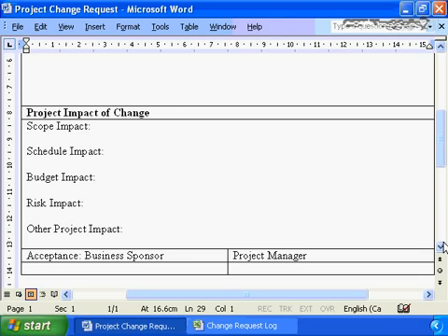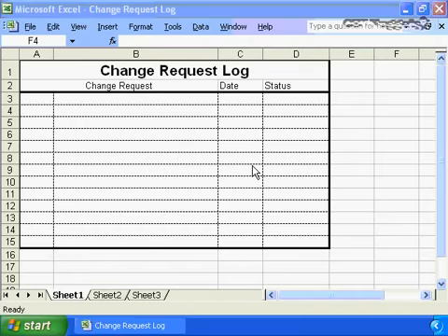Ensure that you're documenting all changes. My preference is you document all changes in something as formal as this change request log, and that this change request log is reviewed, approved, and signed off. If that's not politically acceptable in your organization, then you do it through email, or through documentation on your weekly status report. But you document these changes somewhere so that as people's minds change or people question the interpretation, you have your documentation, you have your audit trail to validate why you've taken the action you've taken on behalf of the project. The change request form is the critical part of our overall change management.